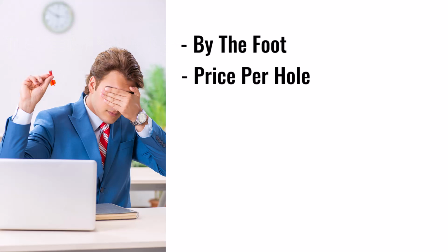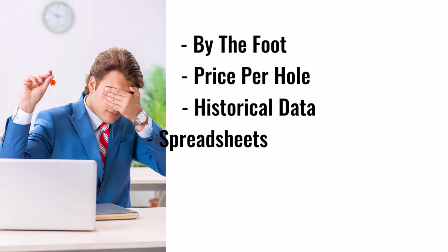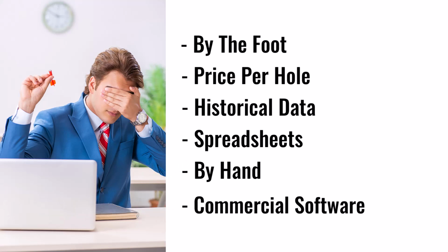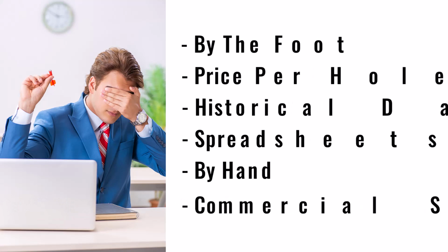Depending on the type of construction and your company's level of detail, estimates could be calculated as a cost per square foot, price per hole, through historical company data utilizing proprietary spreadsheets, by hand with a detailed takeoff utilizing commercial construction labor data, or with commercial estimating software.